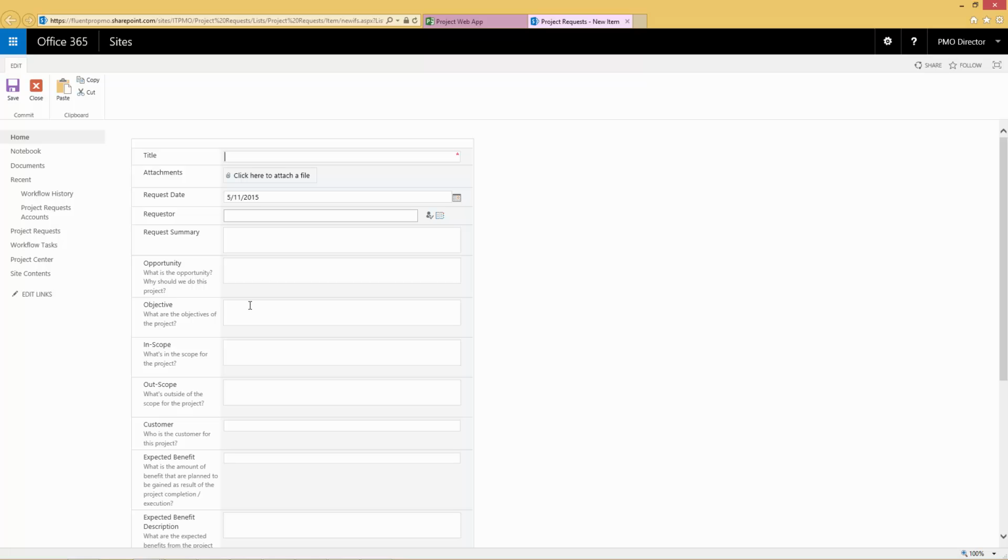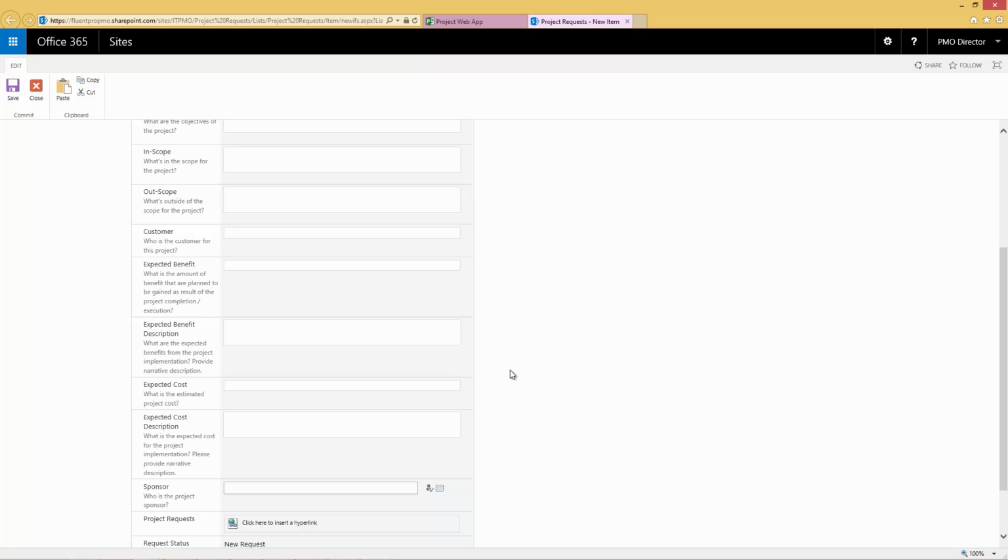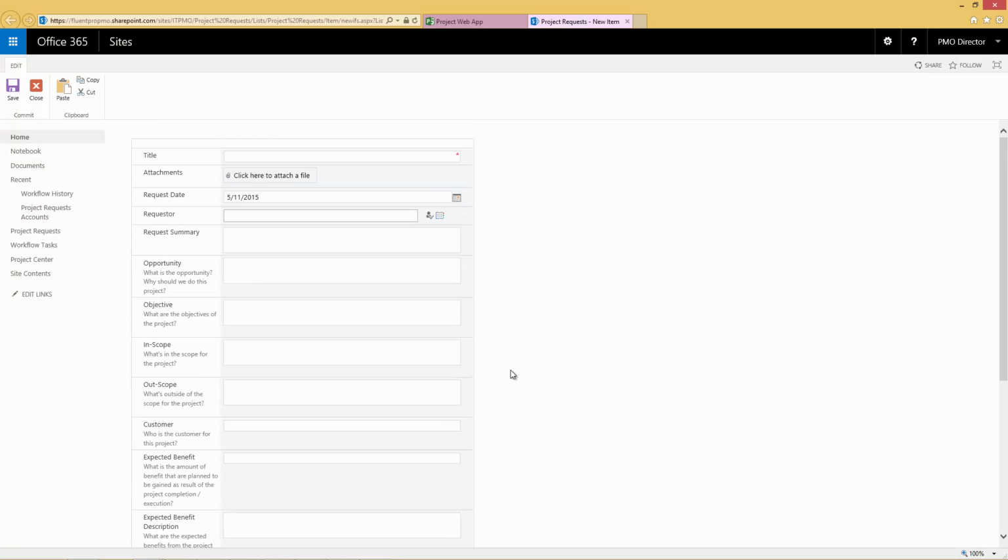And in addition, our solution will go and create a project in a project server, and it will copy absolutely all the values from what the user specified here. All those values will go to the project server. So the new project will be created, and then you can assign a project manager. That project manager can provide additional information, start building the schedule, estimates, and collaborate more on the project with the requester or with additional team members. Later you can use information from this form for your portfolio analysis and what-if analysis in project server.